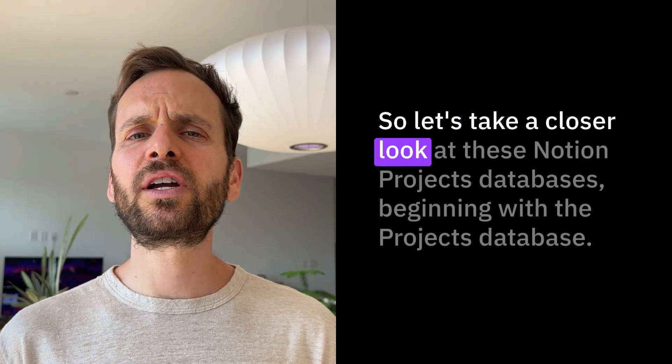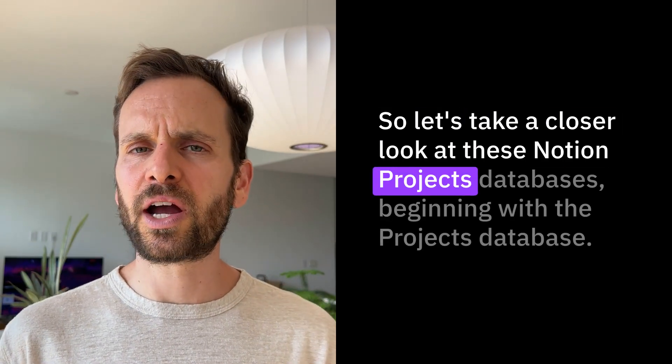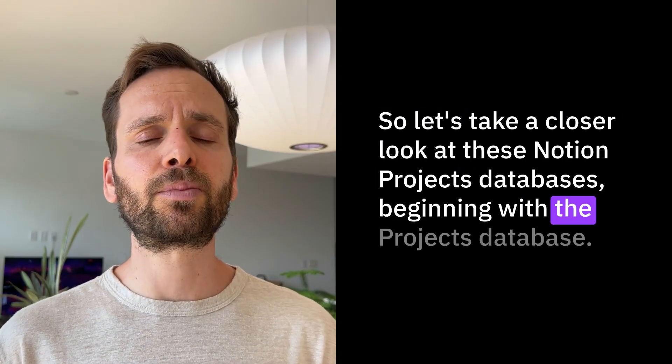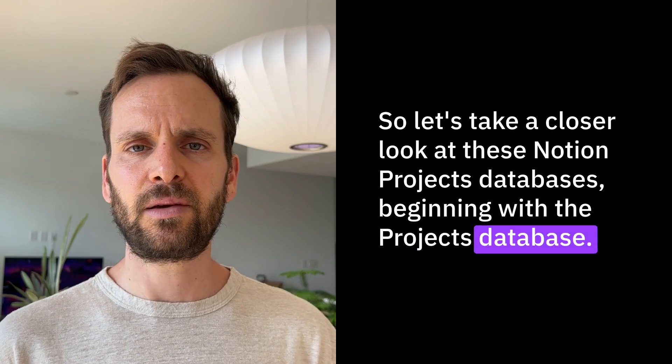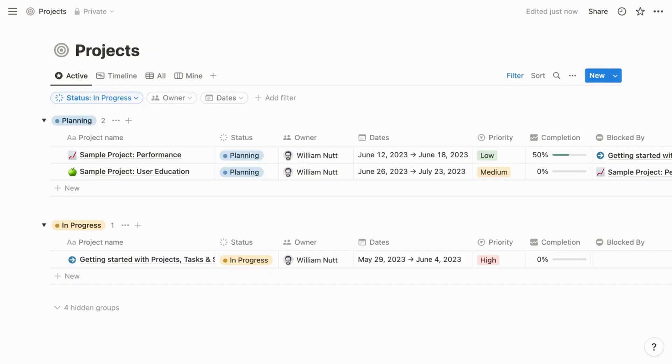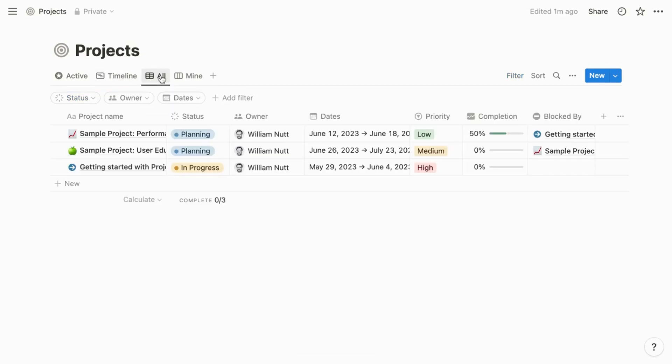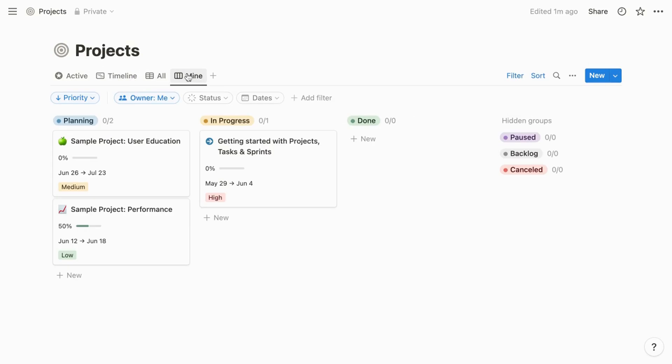Let's take a closer look at these Notion Projects databases, beginning with the Projects database. The system will evolve, but in its current form, the Projects database includes four views. You can view projects within a table grouped by status, as a timeline with visible dependencies, within a full table, or as a board containing only the projects owned by you, the user who signed in to Notion.